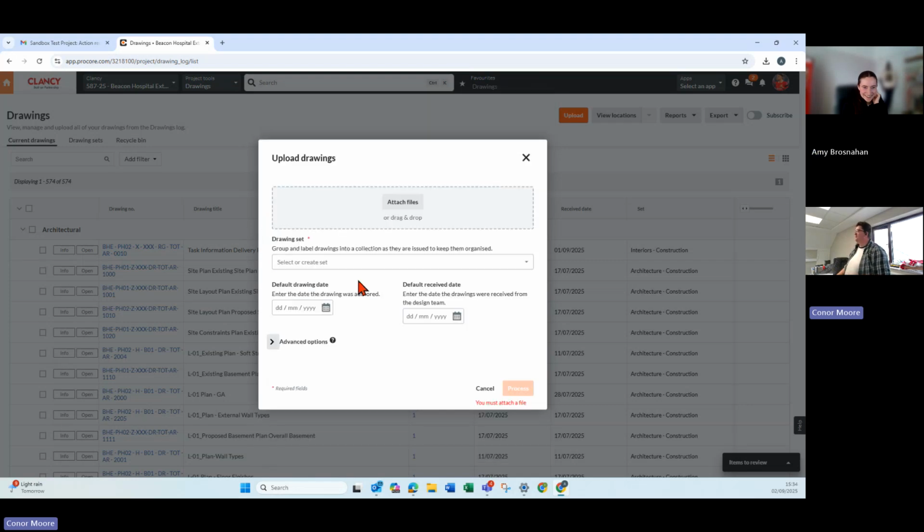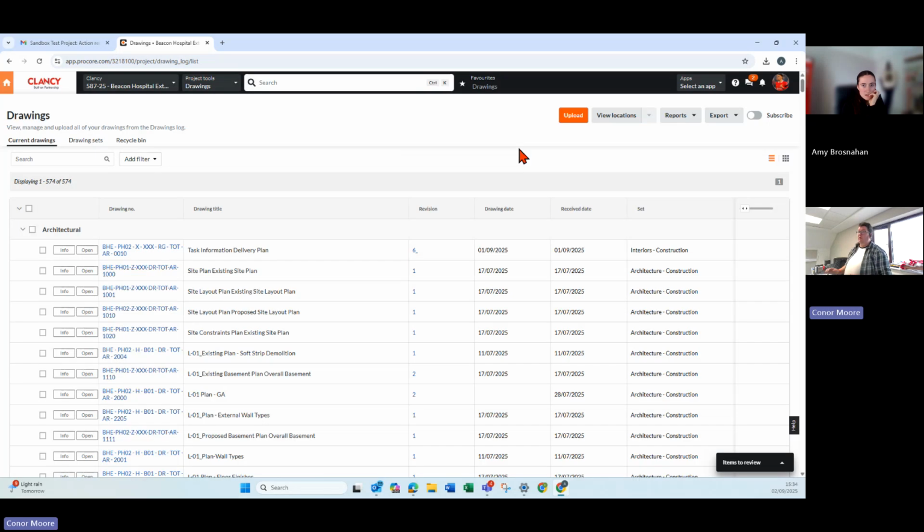But like I said, most of the time, once you upload your drawing, create your set, put in your to date, you don't need to click this at all. Just press the process button. That just turns orange and you press process. And what happens then on our end is we double check that the drawing has the correct title, the correct drawing number, the correct revision, the correct discipline, all that kind of stuff. And then we publish it for everybody else to see.